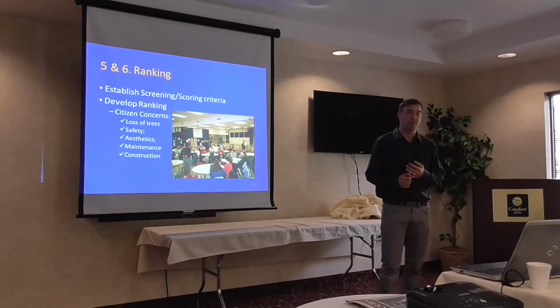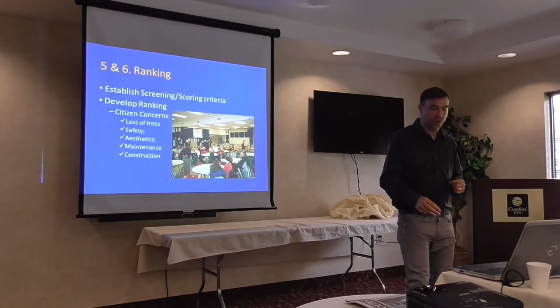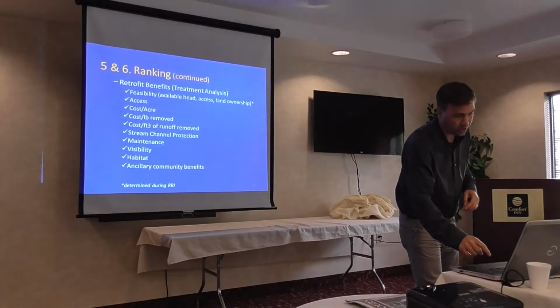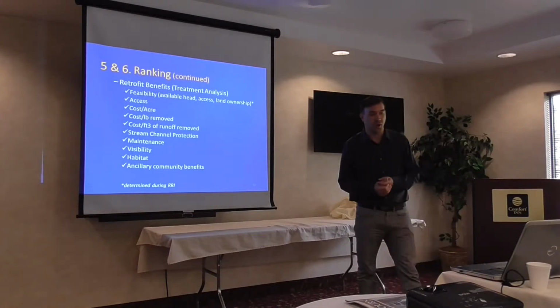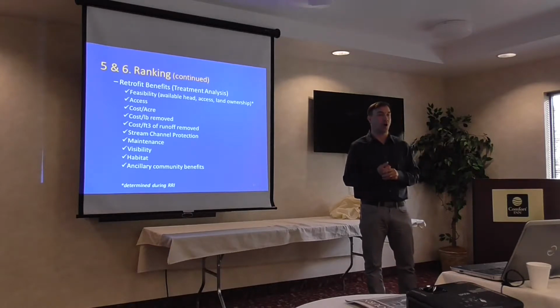What kind of permits do we need to build those? Those all may work into your ranking system in order to determine which of these projects you're going to do first, which ones you're going to do last. Other things that you're going to want to look for is that treatment analysis or the benefits of it.